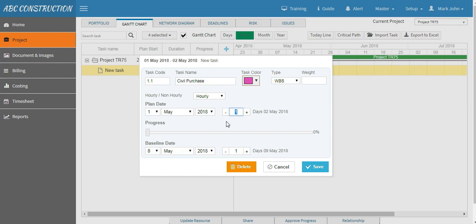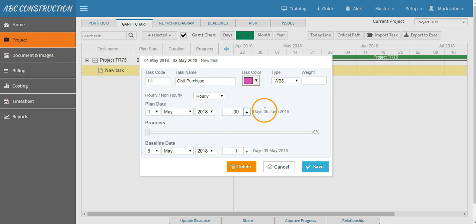Now as we have decided to work six days in a week, so this task will end on fifth of June, leaving a week off. You don't need to change anything in baseline, so leave as it is, then save it.